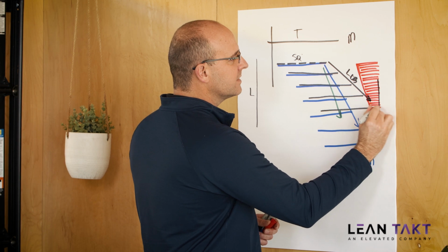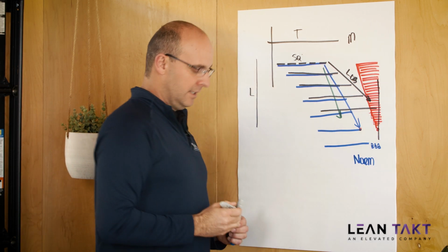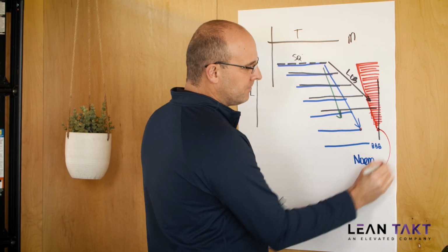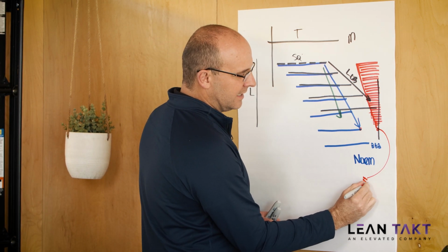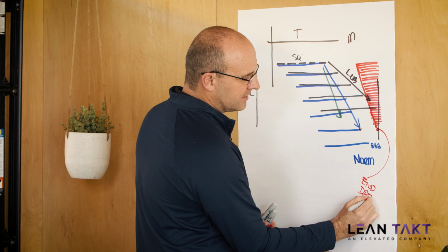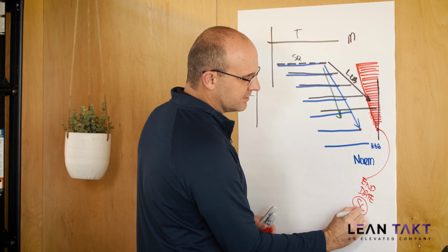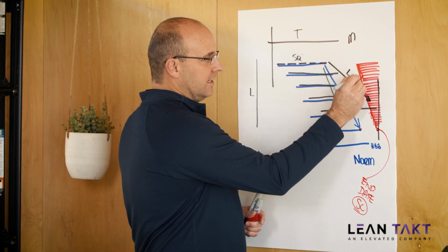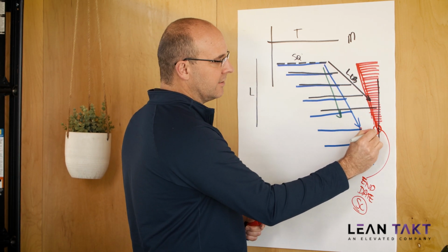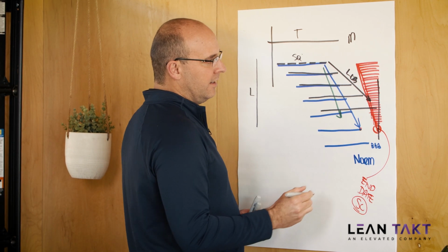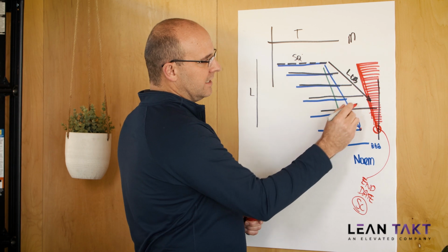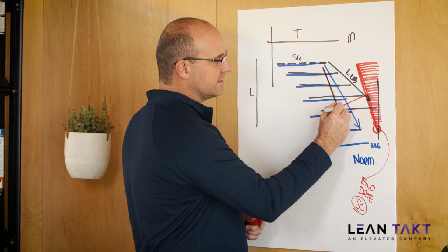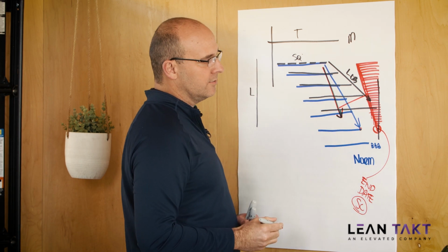So let's look at what it's composed of real quick in case I went a little bit too fast. Your takt point of no return starts at your end date, so probably this is going to be your substantial completion. The incline of this line is going to match your backup, or your absolute fastest speed that you can go.